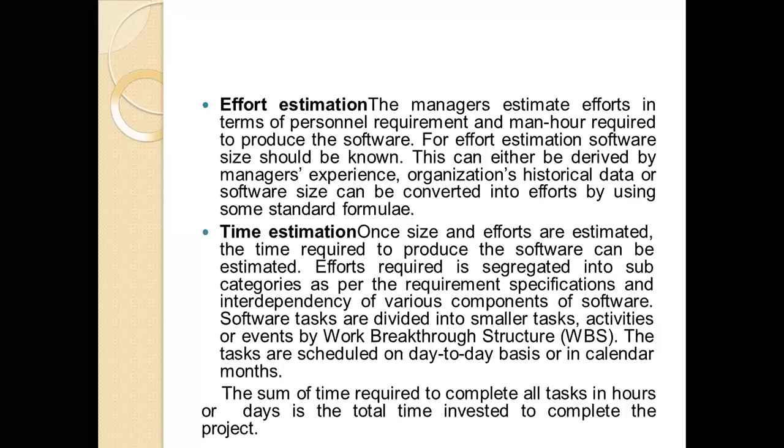That defines the effort. If a particular company has 100 employees and they work for 30 days, and for 30 days they work 5 hours a day, it will be 100 into 30 into 5, and this will define the effort in man-hours. Such kind of things: how many persons, how many hours they will work.